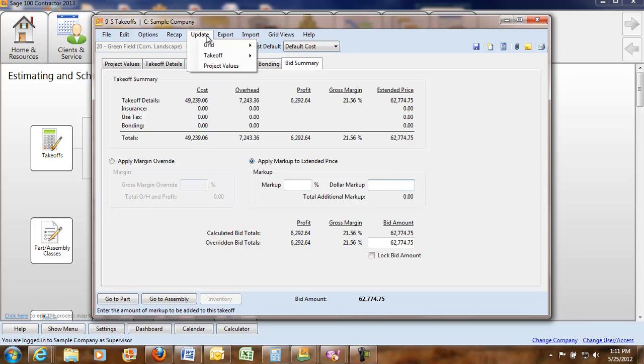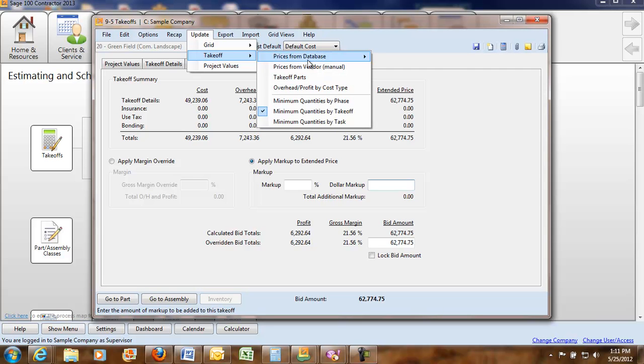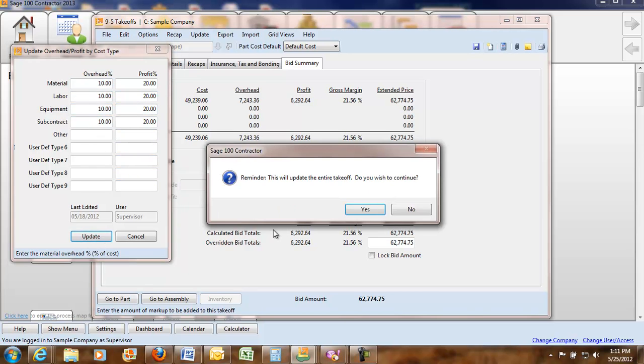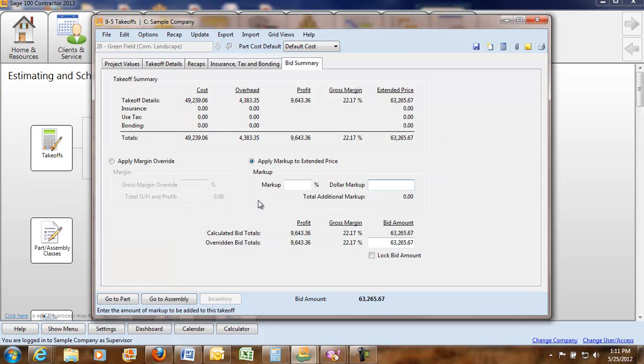You can also within this module put in your overhead and profit. You can say I have a 10% overhead and I want to do 20% profit and you update it and it's going to make changes. It's going to let you know whenever it's going to track when people have made changes also.